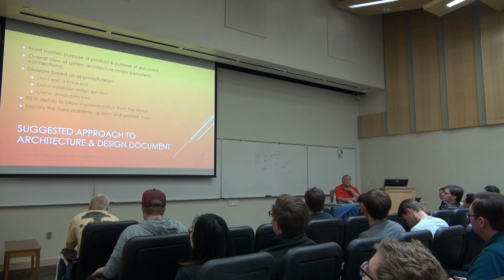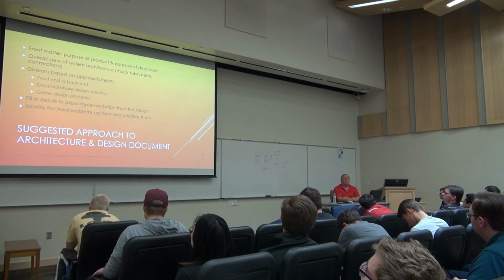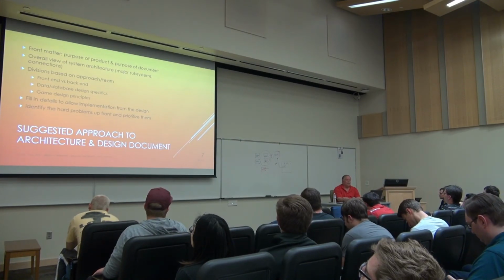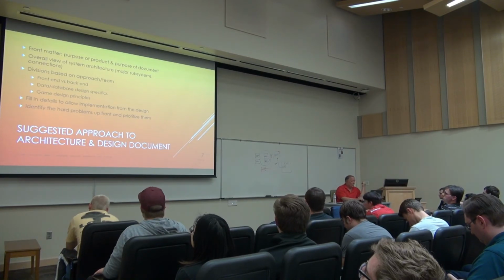This is such a critical issue in software development, and it is so badly neglected in the real world. Everyone goes for the low-hanging fruit. No one hunts the hard problems. And then it gets really ugly when you think you're 90% done and really only about 50% done. No one can quite figure out why.